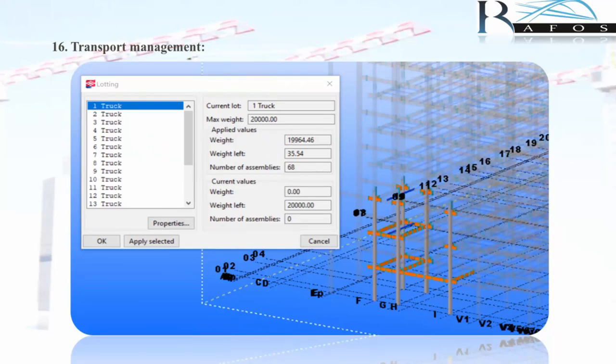As is clear in this photo, these parts are mounted on a truck, which, given the permissible lengths, widths, and heights, is only less than 35 kilos under the maximum authorized capacity of the truck. In this project, the distance between the manufacturer and the project site is about 100 kilometers. In the traditional way, it required at least 45 round trips for these projects. In the new way, using BIM, this number was reduced to 37. That is the cost of 8 round trips, the difference between the use of BIM and the traditional way.